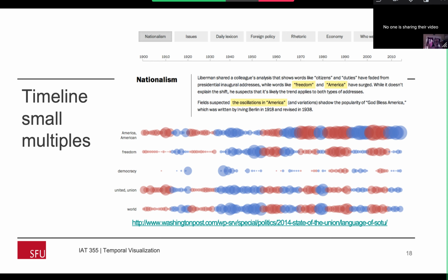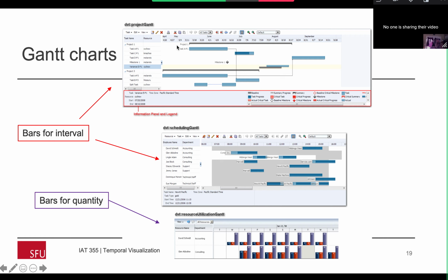Basically the way the Excel one works is you type in cells the beginning and the ending of an event, and it uses a common timeline, which in Excel is essentially a sequence of cells with equal divisions of time, typically. But in more freeform plotters, you have a timeline across the top, where now or some time in the recent past is on the left, and on the right is essentially the planned completion date of the project. And the purpose of the Gantt chart is to show individual activities that need to go on in the project, possibly who's going to do them and how long it's going to take.